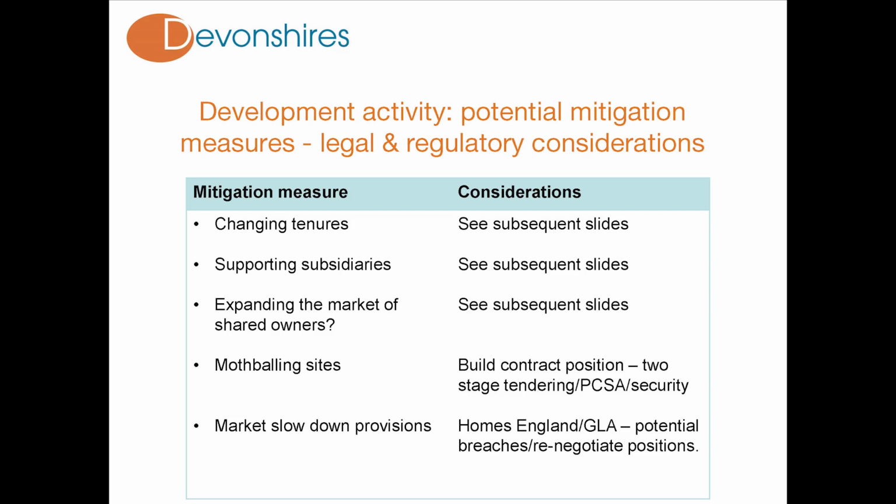There's also potentially the doing of minor works for implementation of a planning permission. Typically, a planning permission will only have 3 years of validity from the date it was granted. It's therefore important to make sure that any timescales associated with planning are monitored so that you don't find yourselves trying to reinvigorate a site that no longer has a valid planning permission for it.